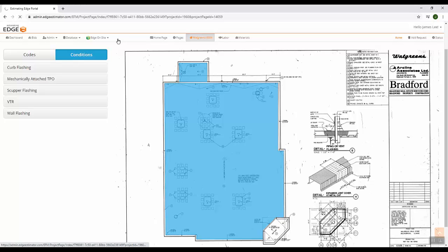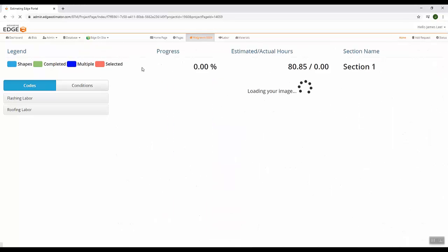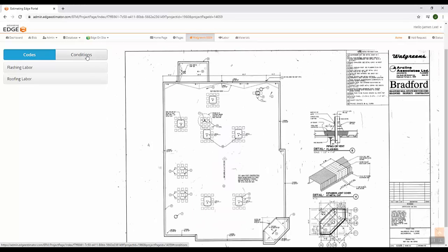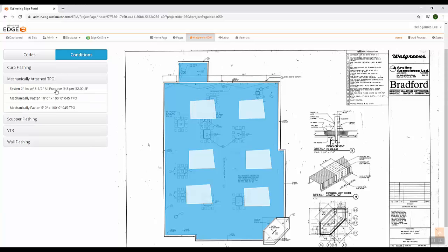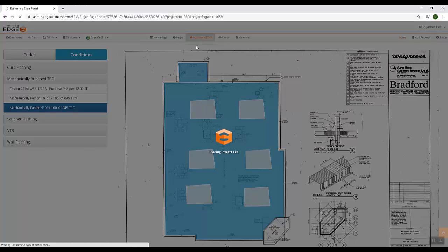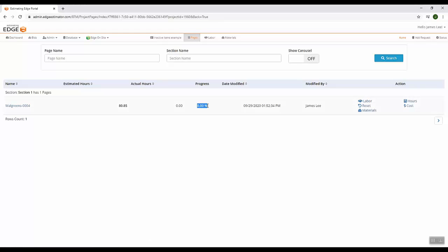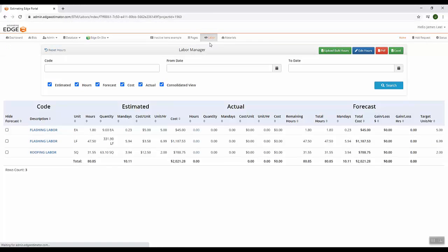So we can go right to our administration portal and give this a refresh because the changes come over about instantaneously. And so let's reload our administration portal page here, and let's take a look at the labors inside our condition again. And we now see the skylights that we added in from our change order. However, when we click on our labor items, we're not seeing the same green shading that we saw before. And if we actually were to come out of our page, we see that no completion is marked and we have no hours. And we can verify that by coming back to our labor screen here.